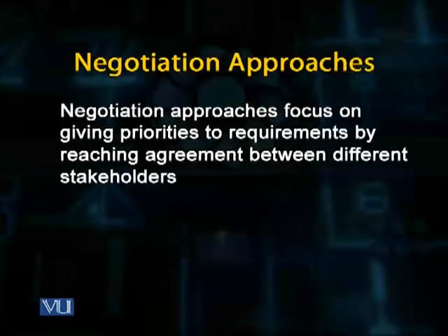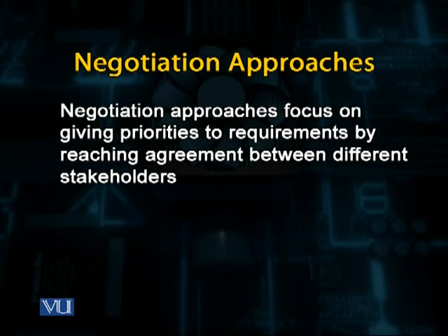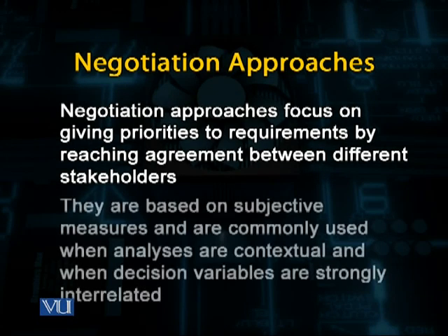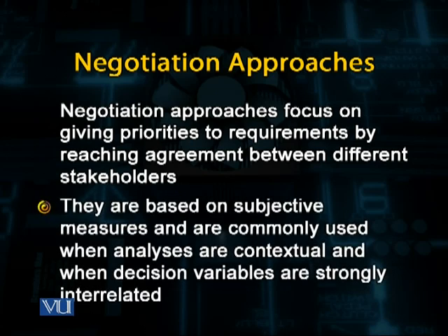On the other hand, there are negotiation approaches. Negotiation approaches focus on giving priorities to requirements by reaching agreement between different stakeholders. They are based on subjective measures, not quantitative measures, but subjective measures, and are commonly used when analyses are contextual and when decision variables are strongly interrelated.